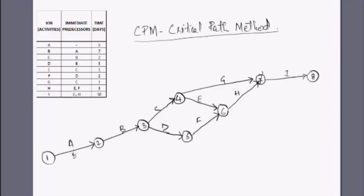The durations are: A takes 5 days, B takes 7 days, C takes 2 days, D takes 3 days, E takes 1 day, G takes 1 day, F takes 2 days, H takes 3 days, and finally I takes 10 days.